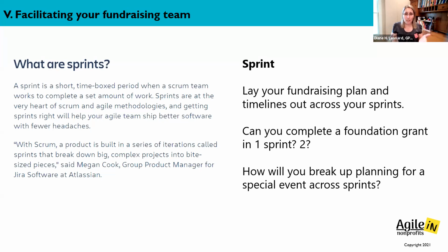So you'll know the best answer for your team. What is it that we create that has some value? It's not that it's done, final, and polished, but what are some of the things that we could create that would be something we could get feedback on, that someone could use or respond to? And that's how we'll set our sprint length.